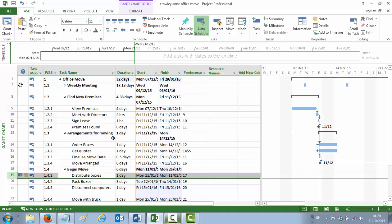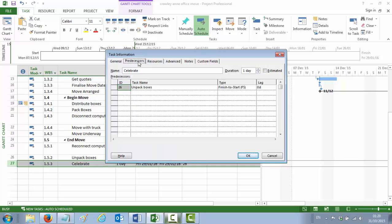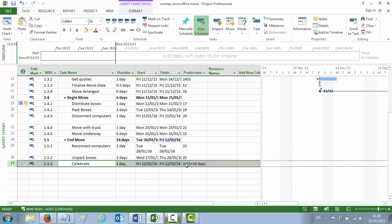Finally, point number 13 is entering a lag, which is telling you that the celebration party doesn't take place immediately but takes place at a delay of 10 days after the unpacking. Here's our celebration — it follows on from unpacking the boxes but with a delay. So we double-click Celebrate, and in the predecessor tab you can see it follows on from Unpack Boxes with a finish-to-start relationship. Over on the right-hand side is your lag — we're saying there's a lag of 10 days. So you enter 10 under the lag column and say OK.